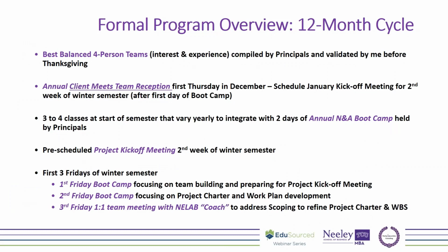So as I said, as far as expectation management, we tell the client it's the best balanced 4-person team, scoping a project to approximately 350 hours. Best balance being when they apply, we will look at their interests and their experience and put that together and get that hopefully done prior to Thanksgiving.